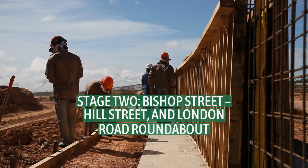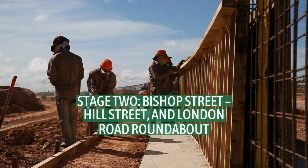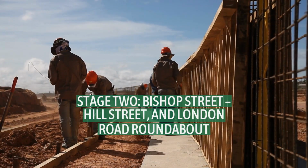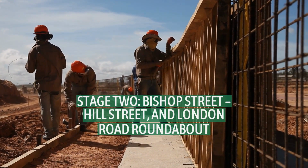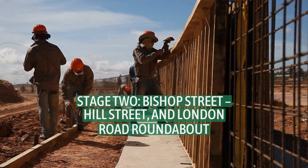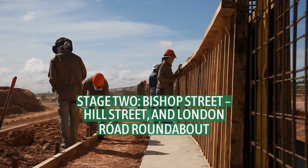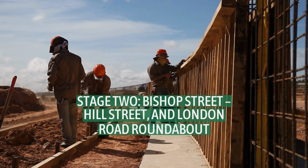Demolition was slow due to issues with relocating residents as well as squatters, and was still ongoing at the end of 1960. By June 1961, excavation was underway at the northern end of Bishop Street to process piping and electrical services. The foundations were laid from July 1961, starting with the southern side of the road, and work on the roadway had begun by early August. Engineers began tarmacking the southbound stretch from Swanswell Terrace to Hill Cross during the week of 14 August, opening it to traffic on 22 August, with the northbound carriageway following on 8 November.